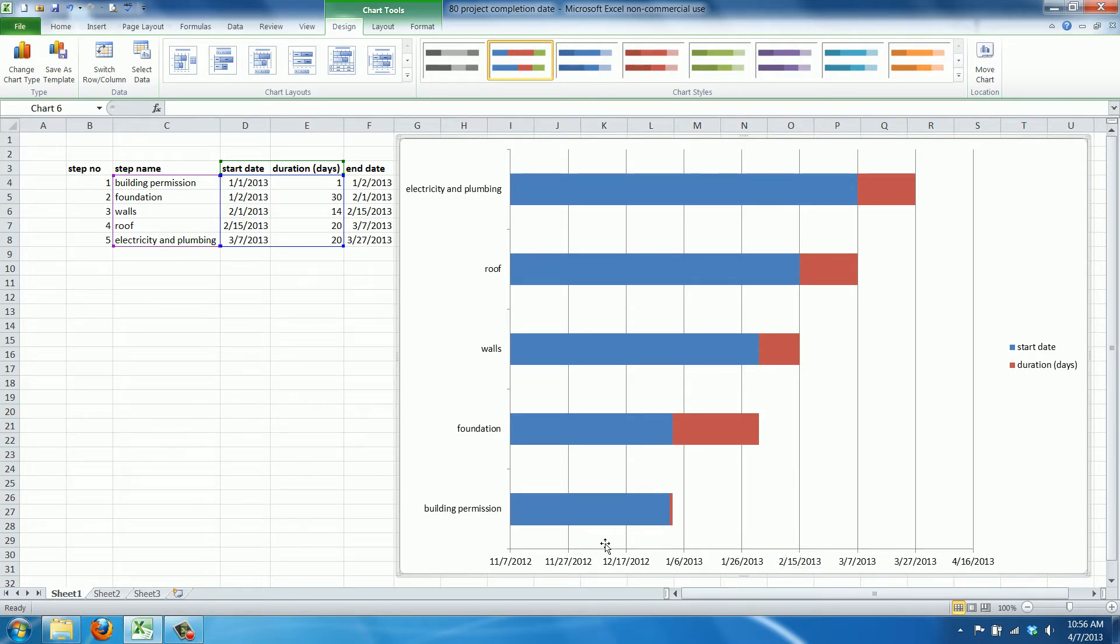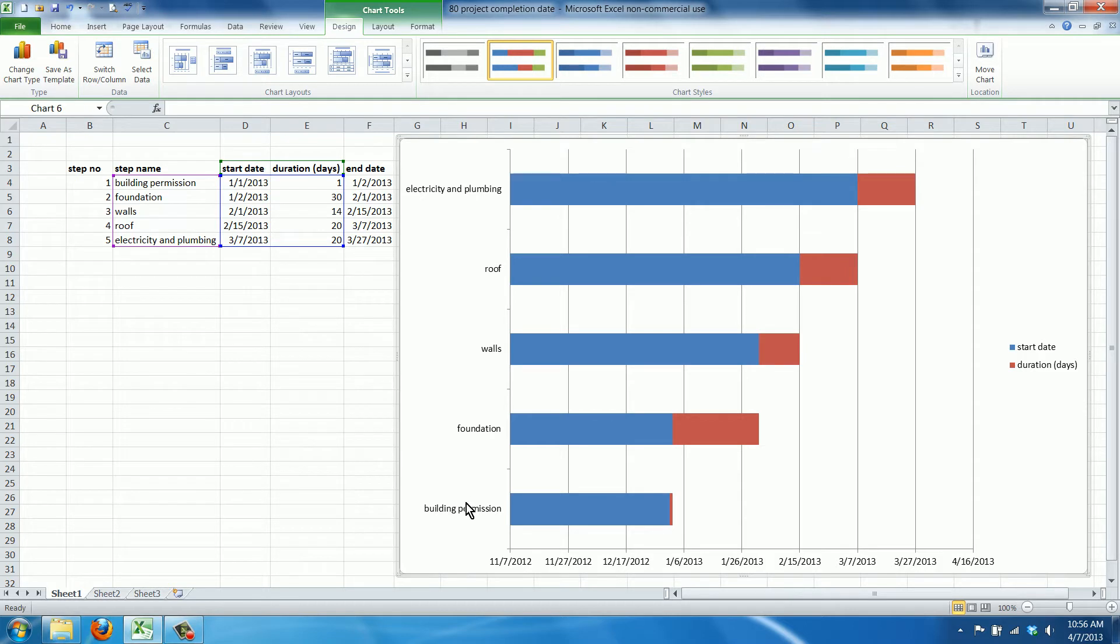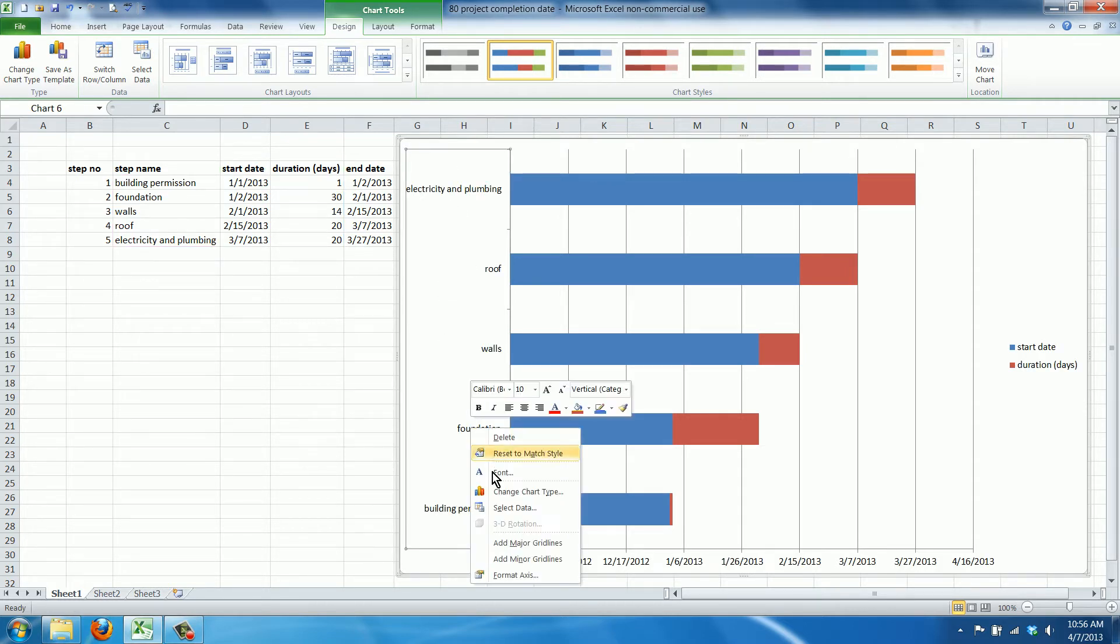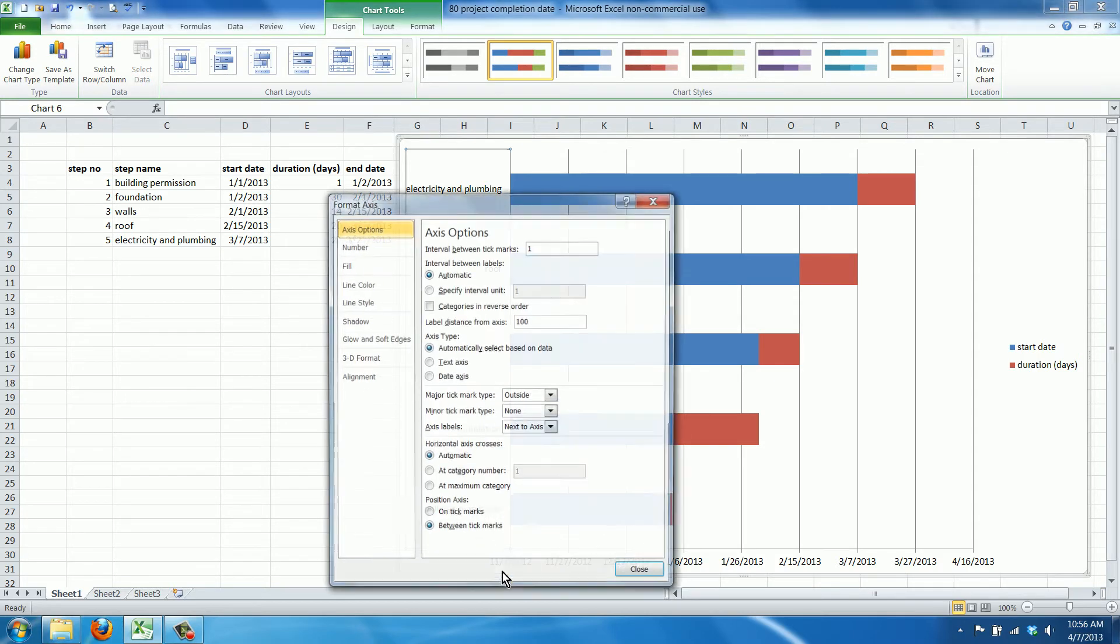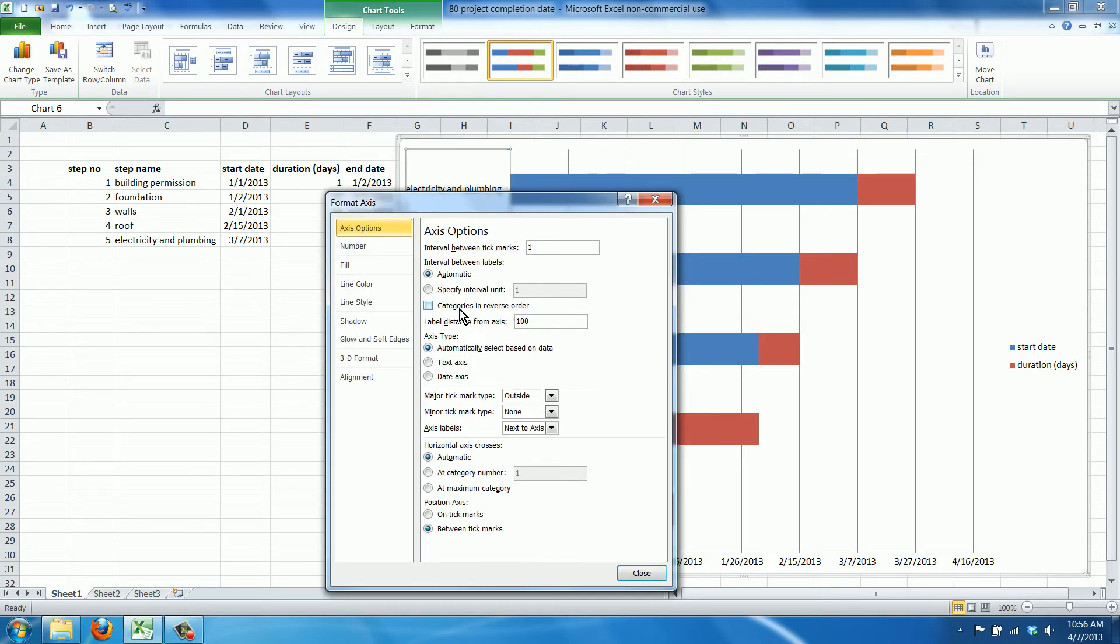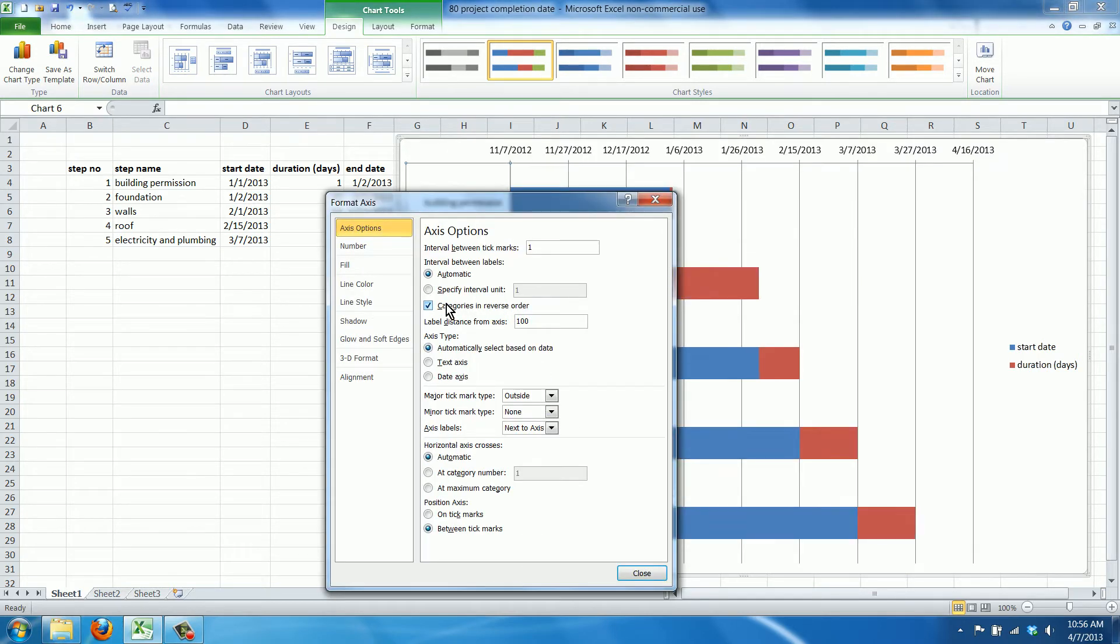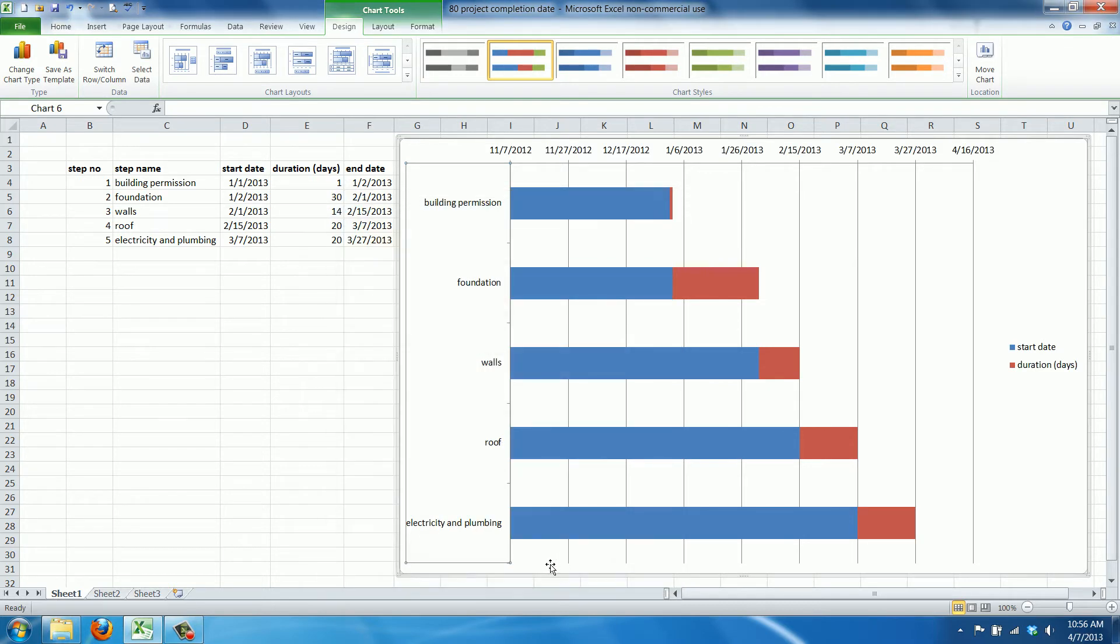The first step we're going to do is in a Gantt chart you want the first task to be on top instead of at the bottom. So we'll select the Y axis, right click, go to format axis, and click categories in reverse order. Now we have the building permission first, then the foundation, walls, and roof.